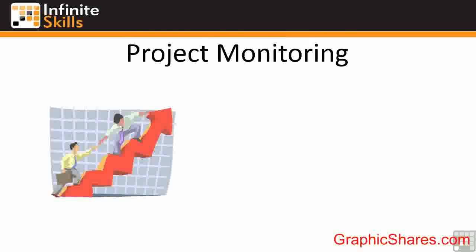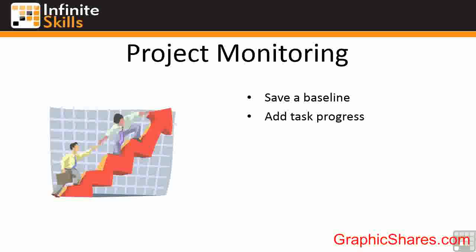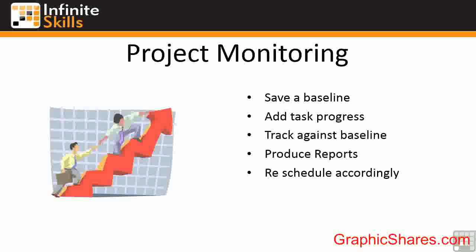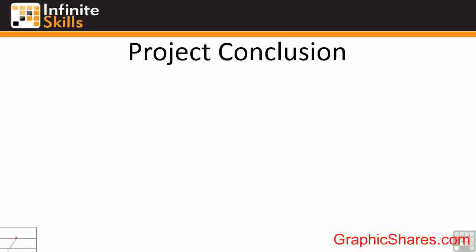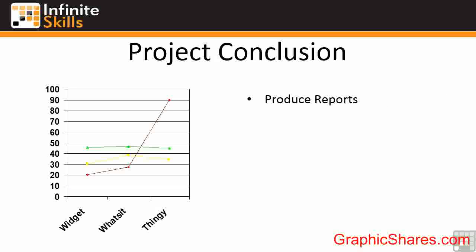Once the project is underway, you can use the same file. Microsoft Project 2013 can monitor your progression by firstly saving a baseline — a snapshot at a moment in time that says this is our plan and this is what we want to measure ourselves against. We can then add in task progress as it occurs and track ourselves against that baseline at all times. There are a number of pre-built reports and you can even build your own. Inevitably you will need to reschedule as you go — weather, time of year, and many factors come into play. Once the project is complete, you can produce reports to summarize what you've done.